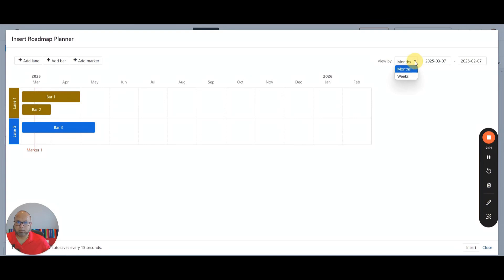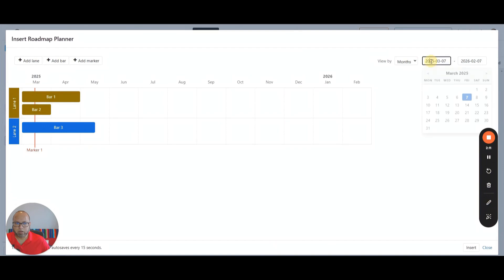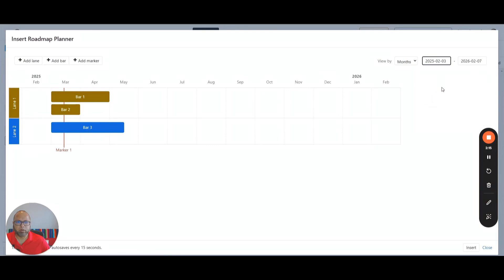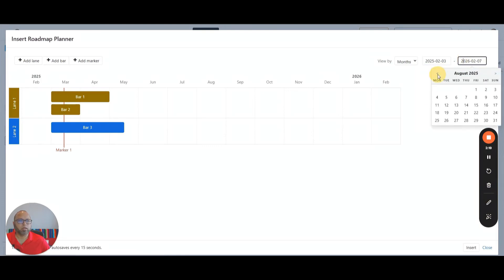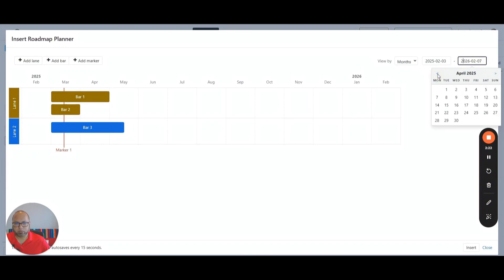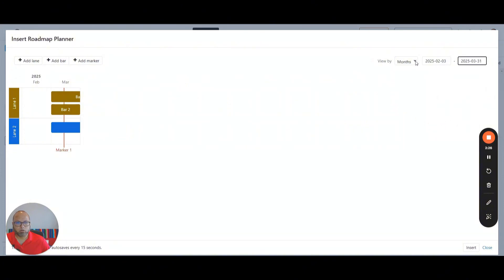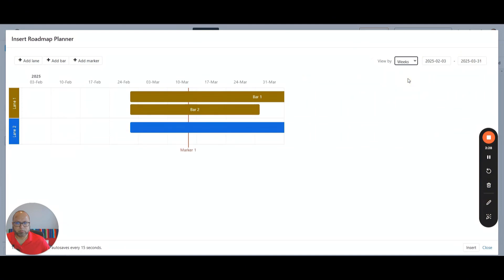I could show the timelines in months or weeks, and I need to specify when the time starts. In my case, I want this to start on the 3rd of February. I want it to show not that far out, but maybe end of March. And I want to show these in weeks. So this is my timeline for my two projects.